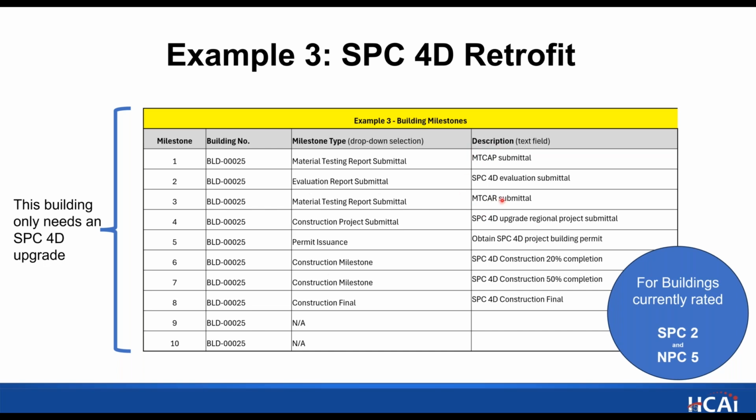And then the MTCAR is what you send in after the drawings are done, all the testing is done, and the results are in. This is the results of all that testing. So this would be the date that you plan to submit that to the Seismic Compliance Unit.